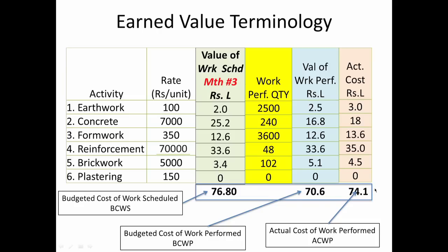Earned value gives us insight into the project both at the project level and at the work package level. As we go into more detail within the work breakdown structure, we may get down to activity level, in which case we can use the direct monitoring approach of quantity versus total quantity, productivity, and similar measures.